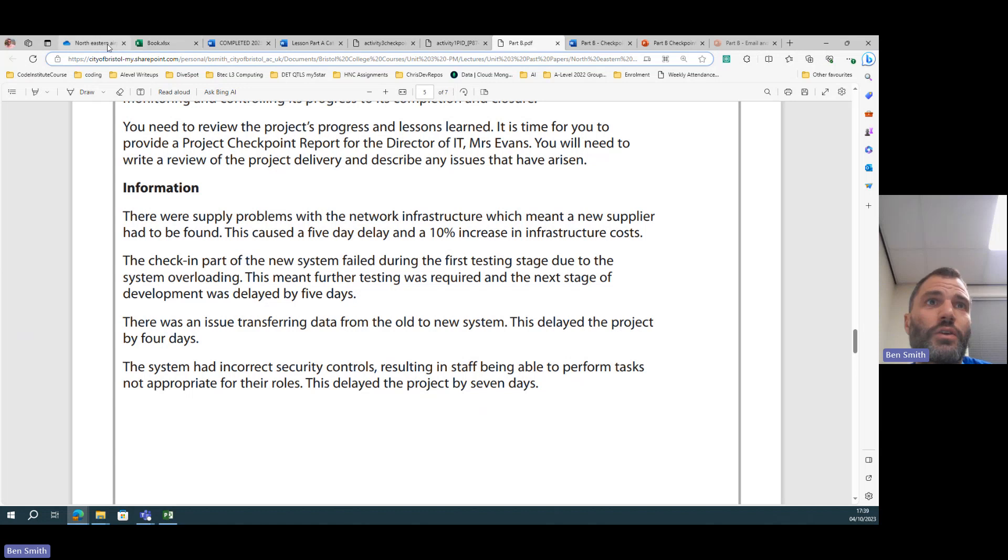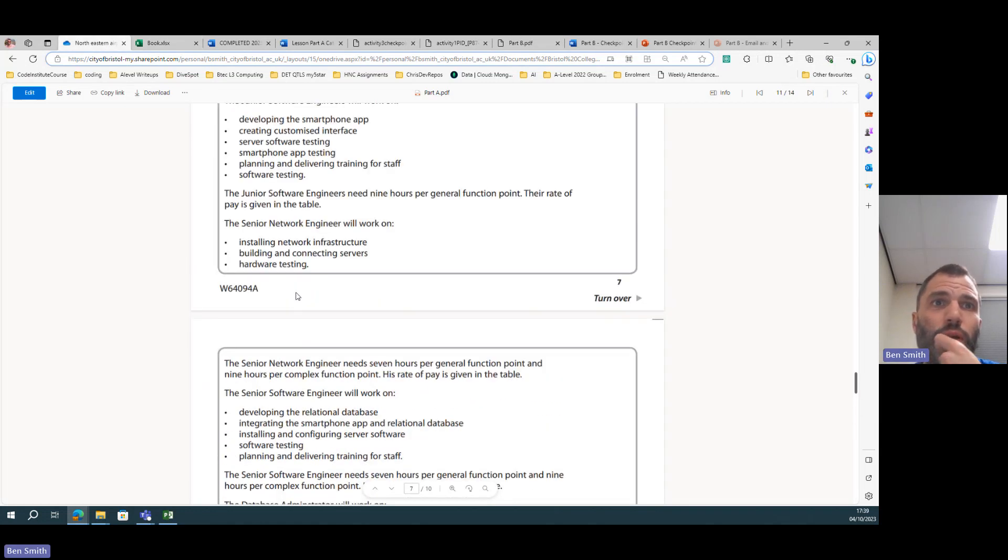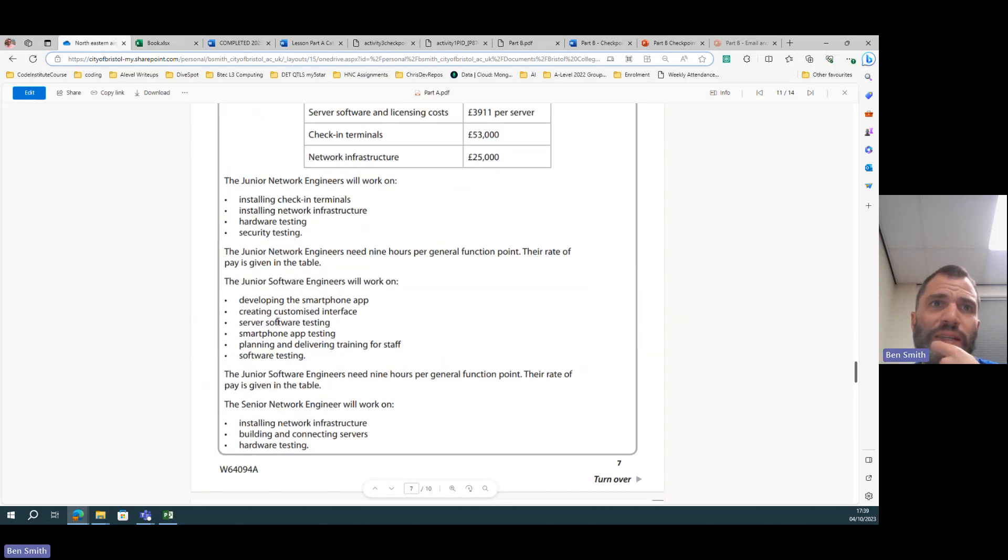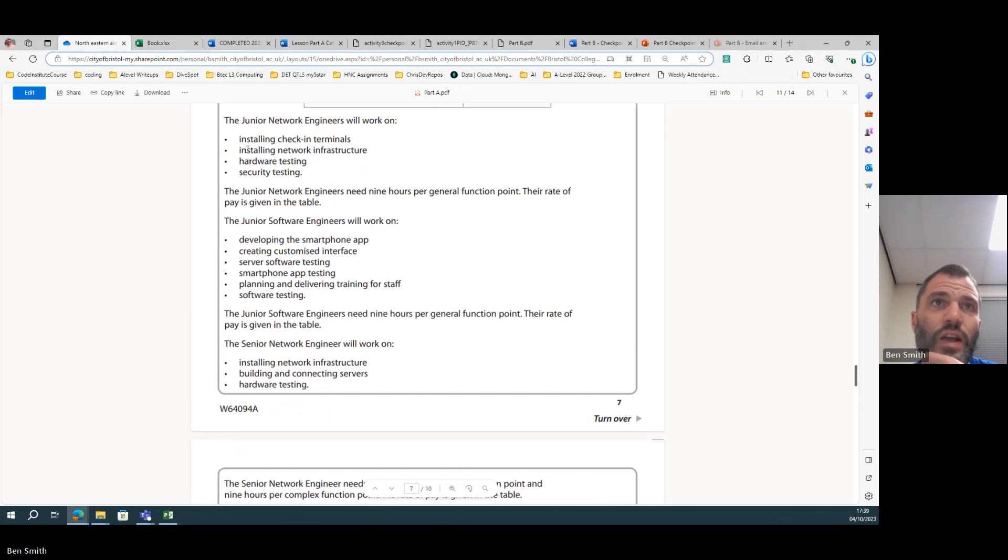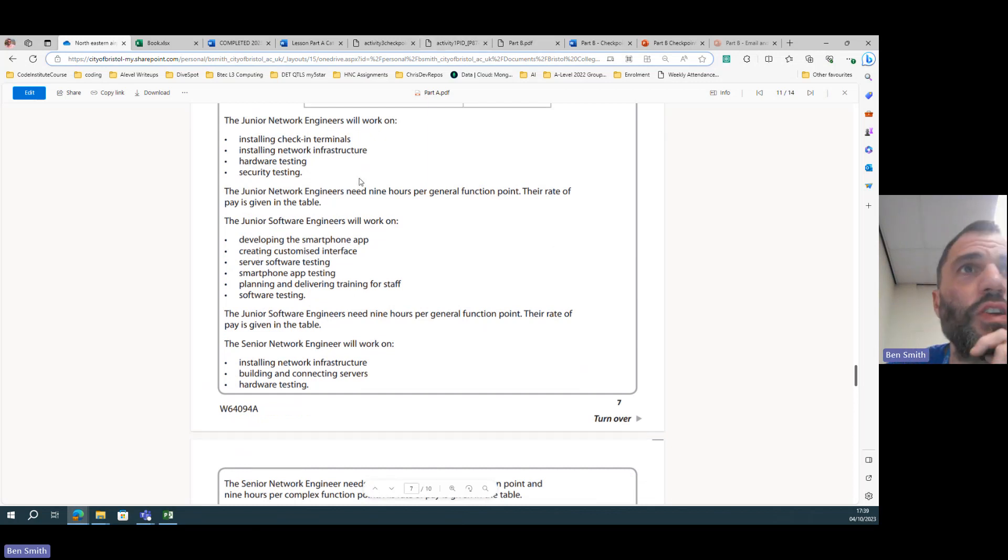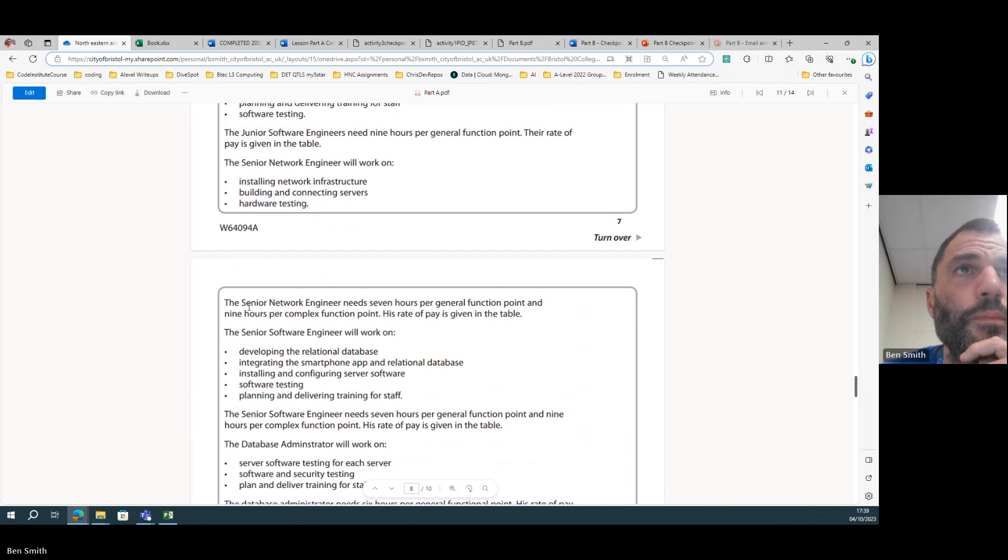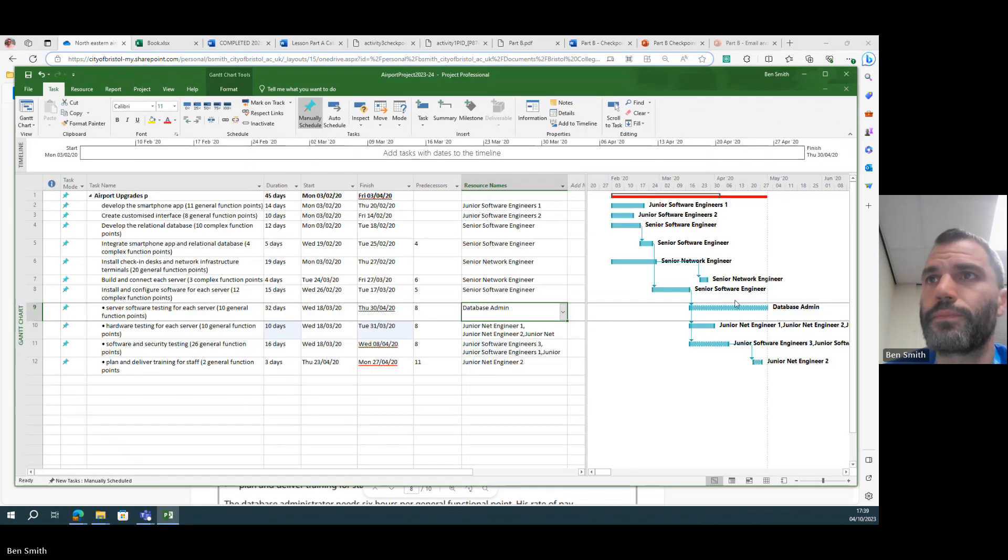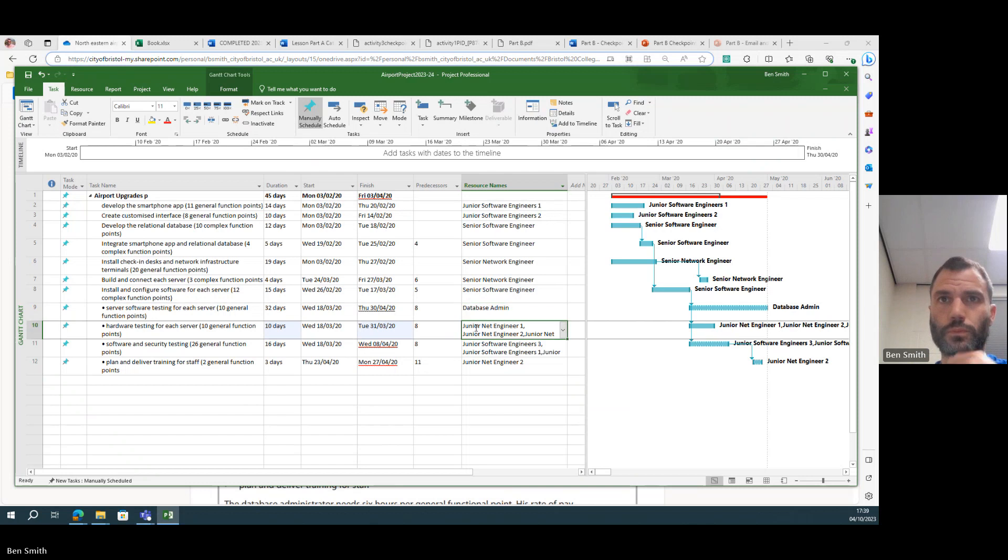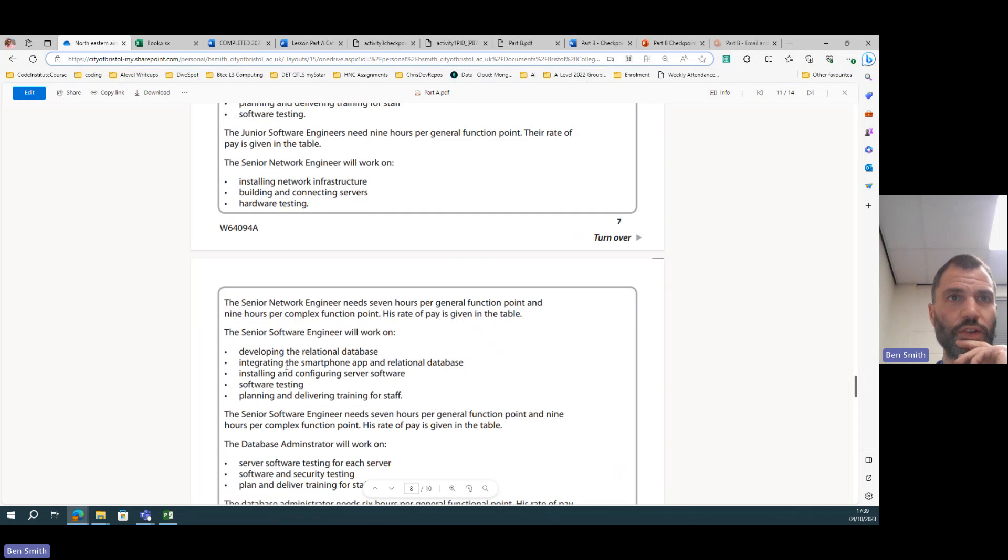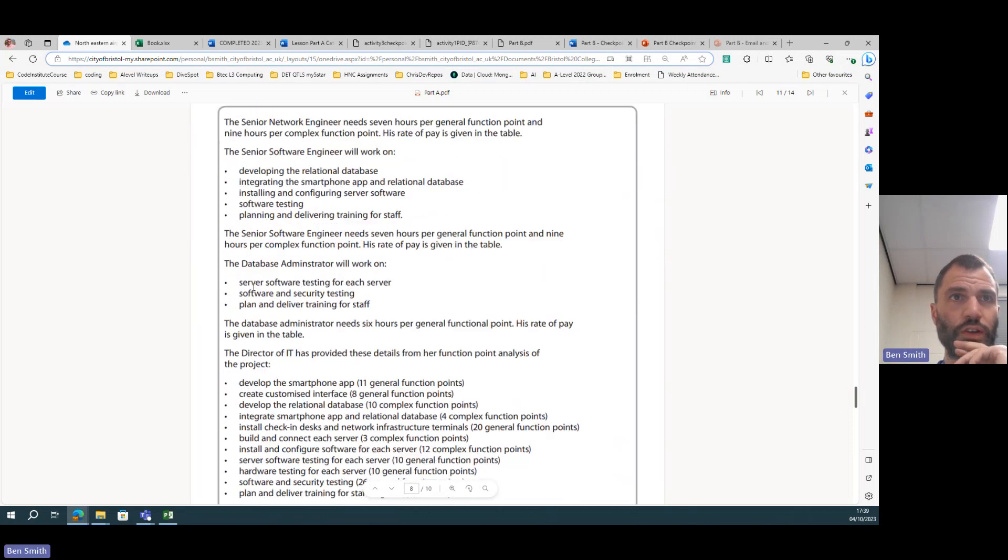So it's a much shorter time, and the same for this one as well. Now I can't remember who else can do server software testing, so we need to go and look back at the part A scenario, look at the people who can do it. Server software testing, junior software engineers. Junior software engineers can do server software testing.